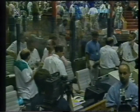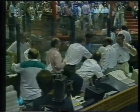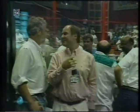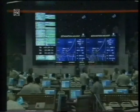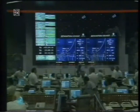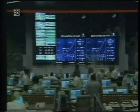Yes, Paul, some very important milestones are ahead of us beside the scheduled Ariane 4 launches to satisfy our customer needs. Two more qualification flights, Ariane 502 and 503, are scheduled. First to take place sometime April 97, and then the 503 in the September-October time frame. And the 504 launcher, from the hardware standpoint, will be ready to support an early 98 launch, which will be the first commercial launch of the Ariane 5 family.